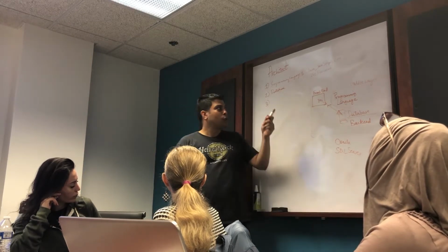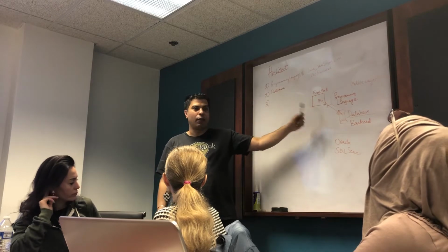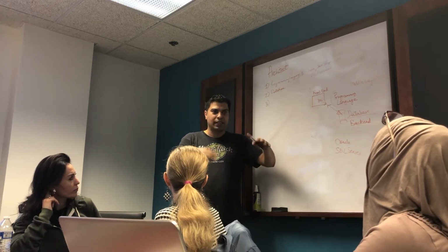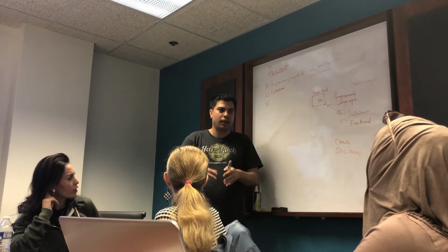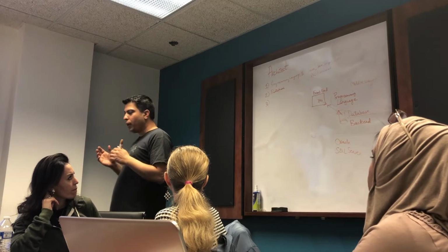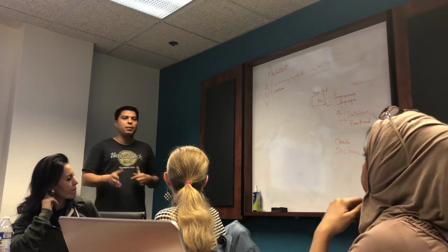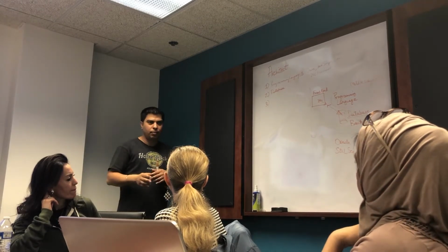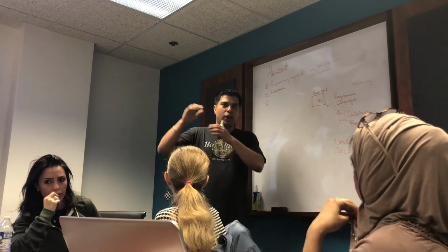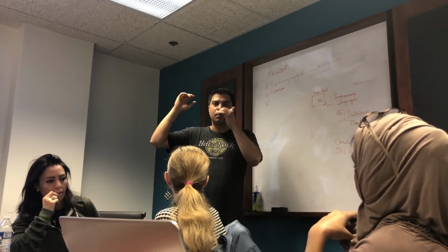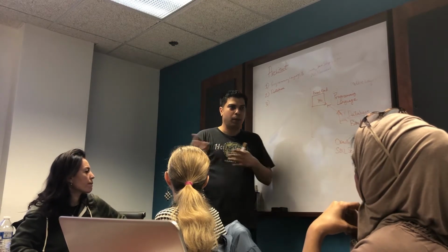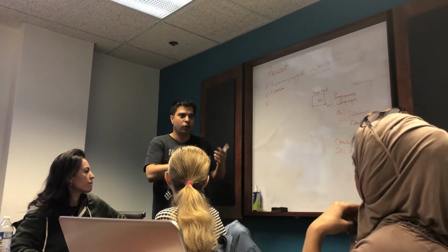Okay? So now if we are building Bank of America, okay, might not be a very good example. So let's say, for example, we are building Amazon. Now, should we spend the time and money to build the payment system, which will cost $1 million, or a system already exists, can we just buy it and integrate it with our software? It'll be cheaper. Maybe we'll pay $150,000 instead of building it.